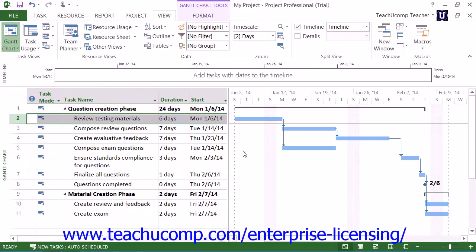Microsoft Project uses effort-driven scheduling by default when you assign your work resources to or remove resources from a specific task. For example, if you assign one person to a task, Microsoft Project will calculate how long that person will take to complete the task based on their work availability. If you assign another person with the same work availability to the same task, Microsoft Project would then decrease the total duration of the task by half, assigning the total workload equally to the two resources.